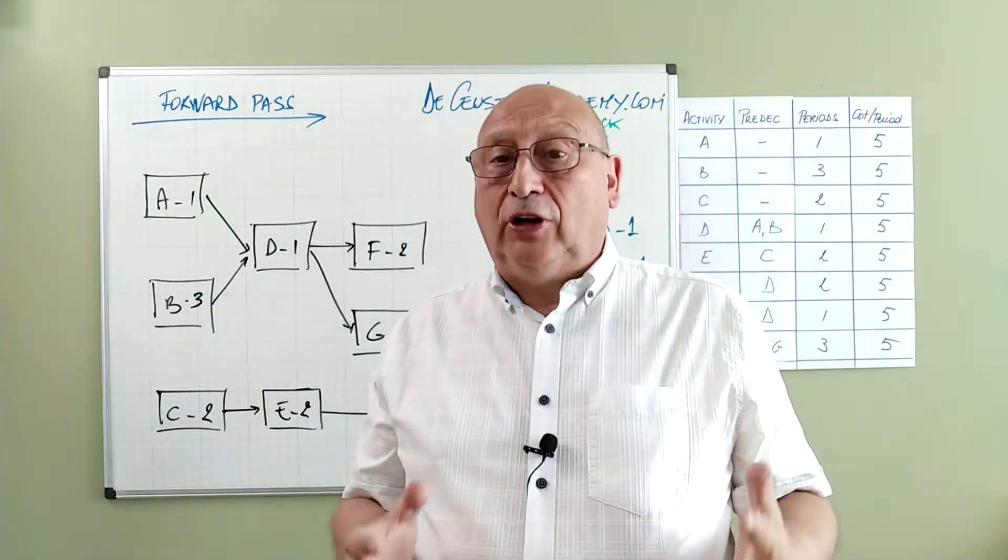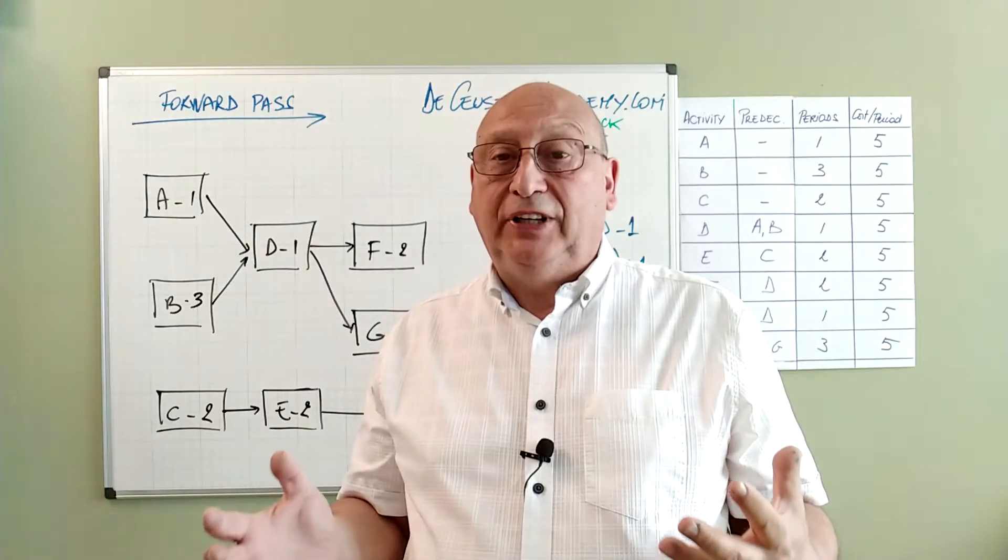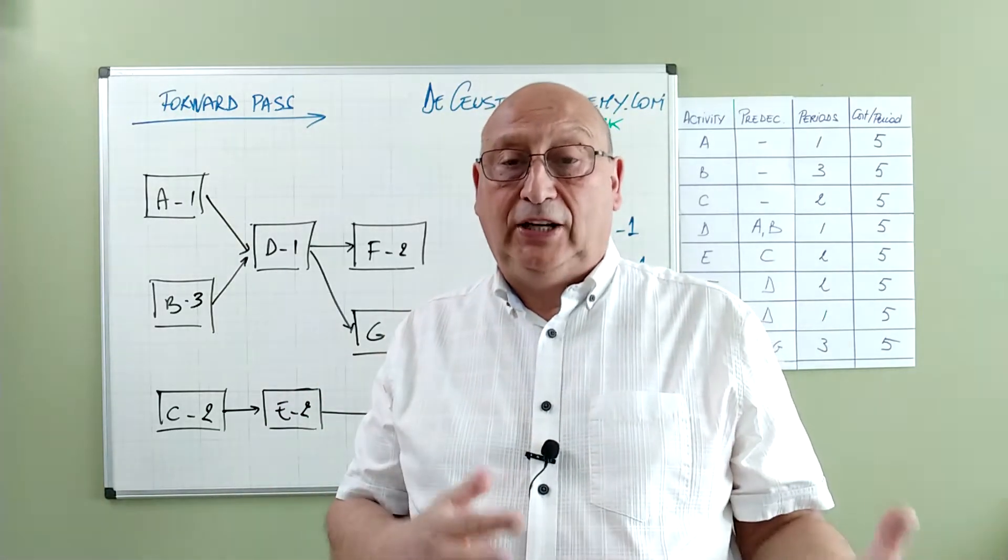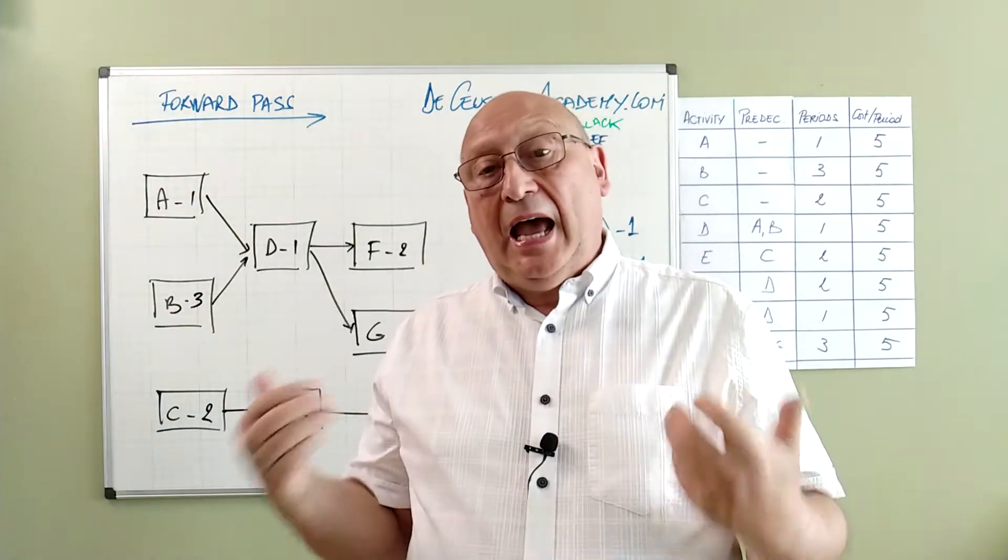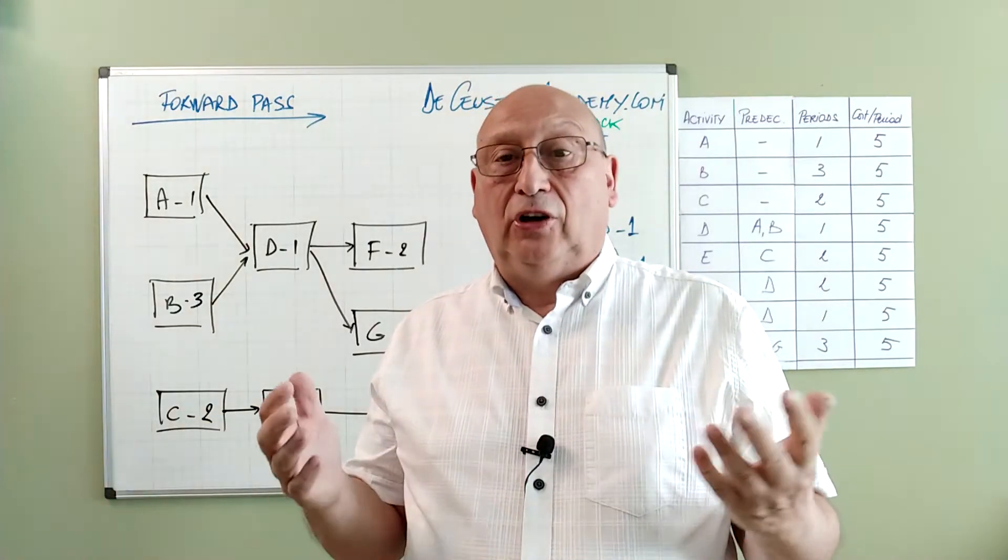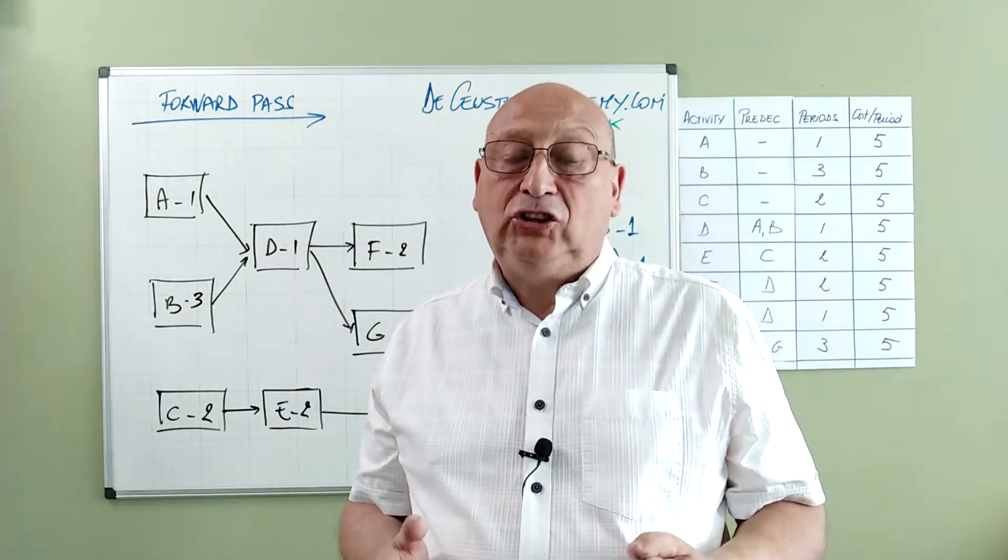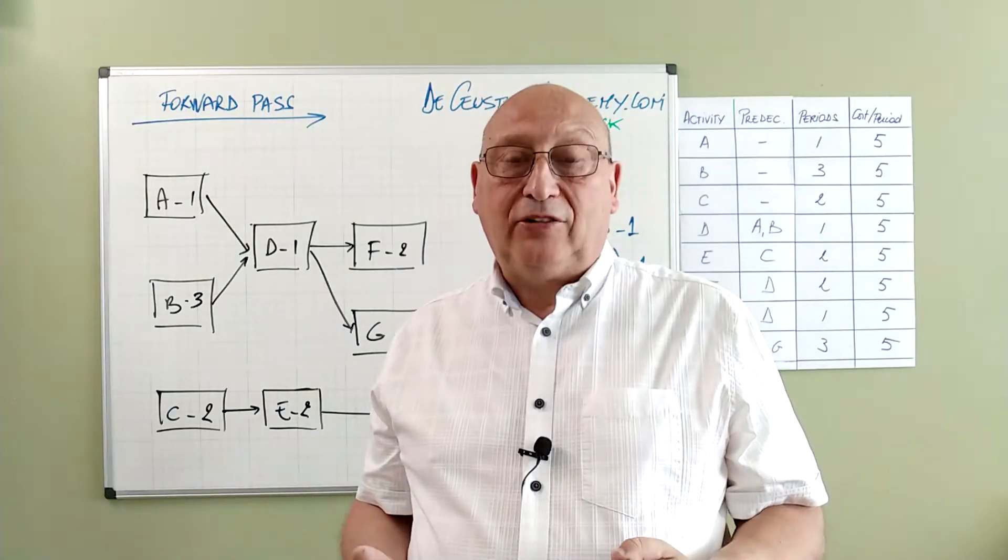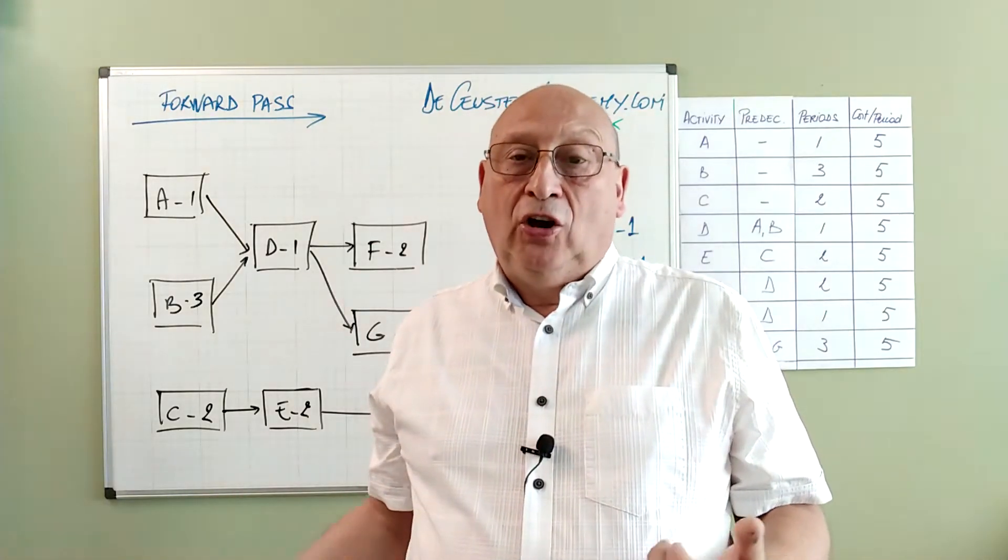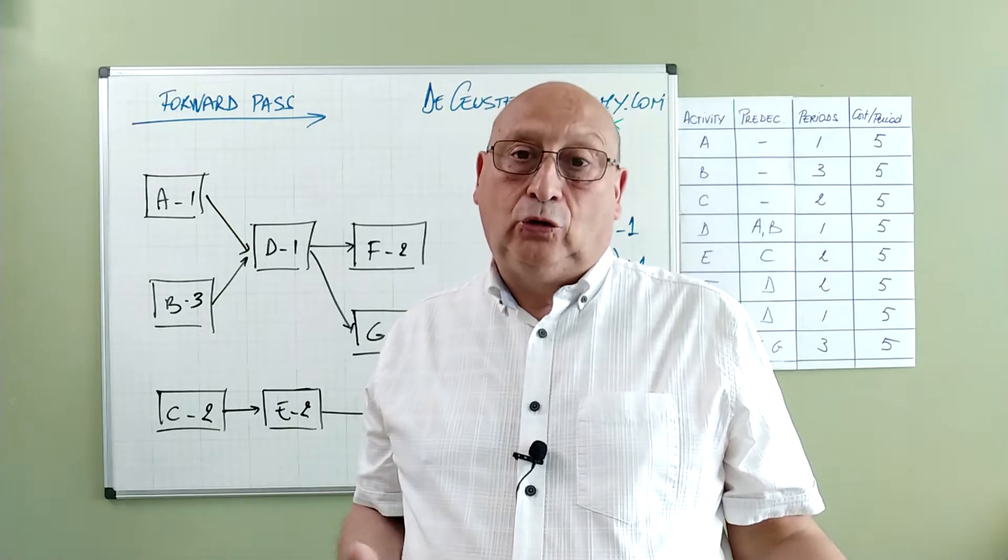We call the calculation of early start and early finish the forward pass. We calculate from left to right. And when we calculate the late start and the late finish we call it the backward pass. We calculate back from right to left.